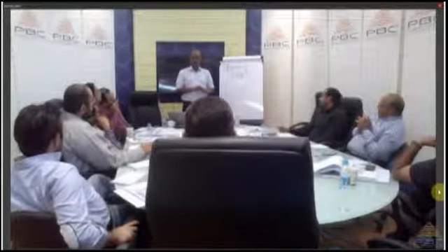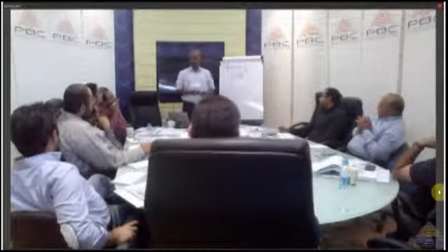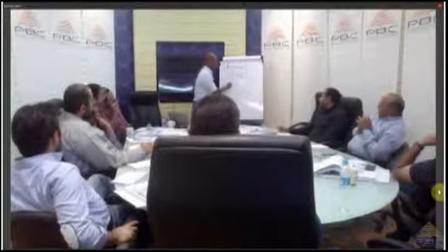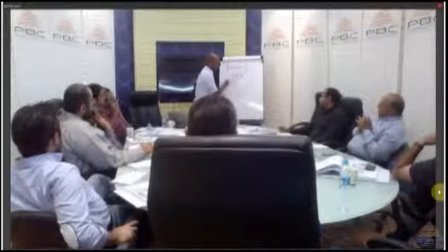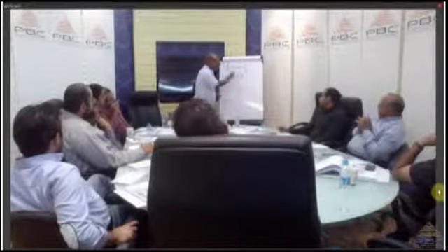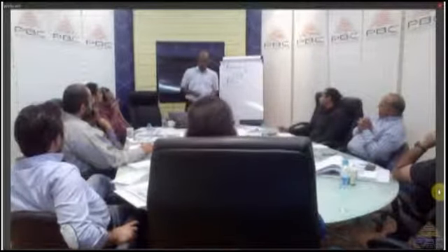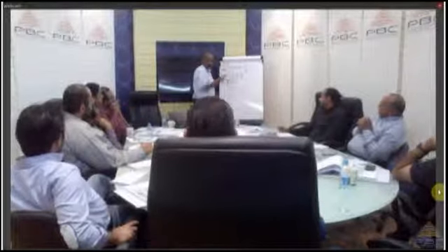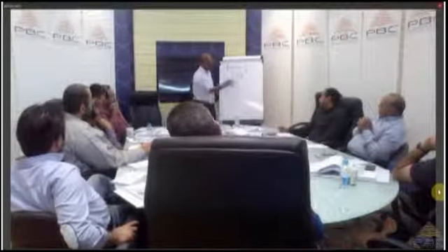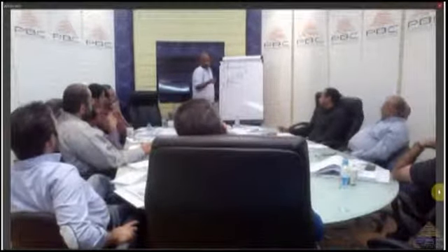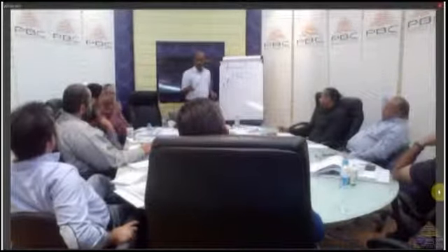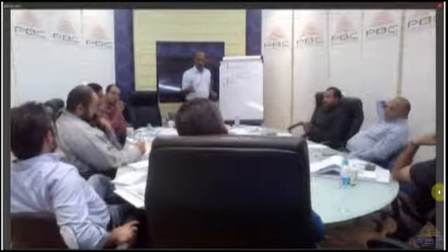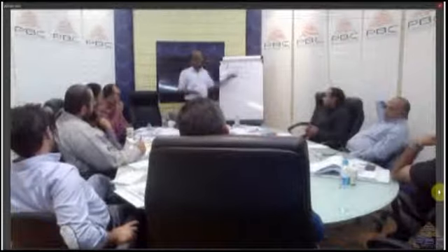Or let's say my failure is 50%. My cost to my business is $20,000, and that includes reputation damage as well. So do I spend 50,000 to save 20,000? Of course not, only for my projects for 1 year. I say to hell with it. It's too much.